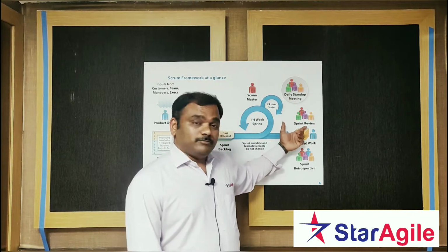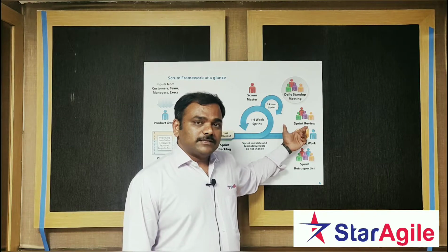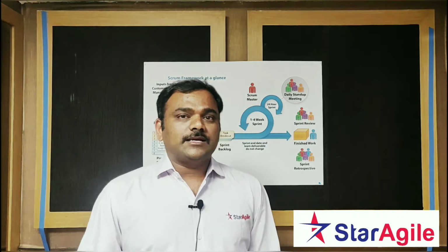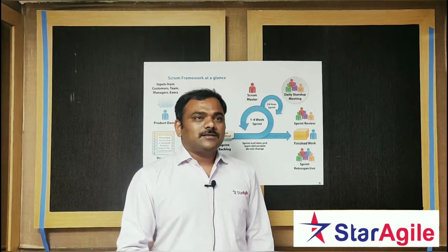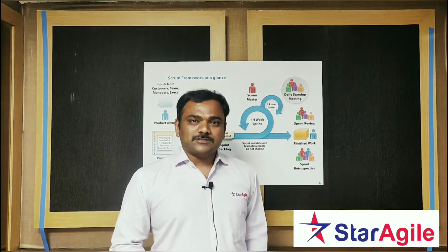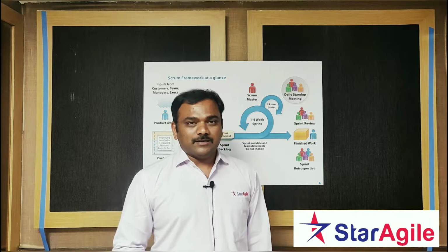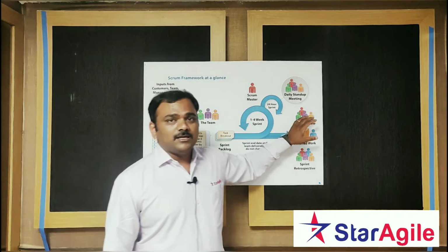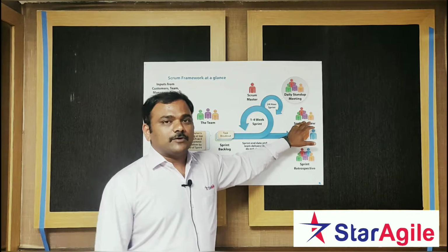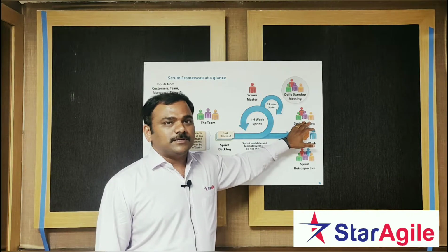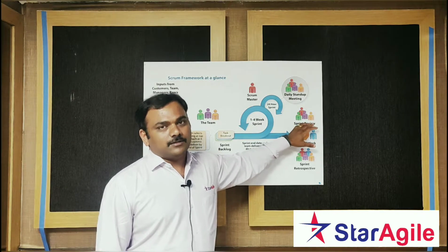And most important to remember in sprint review, I would say, is it has to be done through working software. A lot of times people conduct sprint review as a meeting where they get a big slide deck and talk about what they have accomplished. I don't think it's a great idea to do that. Sprint review has to be done through working software, and that's when stakeholders have an opportunity to see what the team has built and give actionable feedback on that, right?